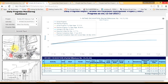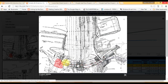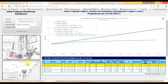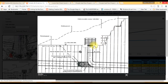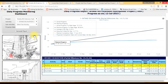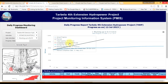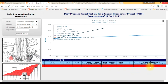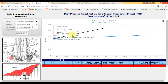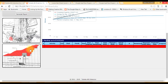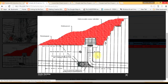Going further into detail, you can see the overall dam and which specific part we are talking about. Here is the actual drawing for that intake part, showing the excavation. We can go further down — let's say we are interested to see mucking. If I generate a report, you will see the same data but in quantitative form. It has shown with a red mark that this activity has already crossed its time limit — it is already time-barred. It was supposed to finish earlier but is still continuing.